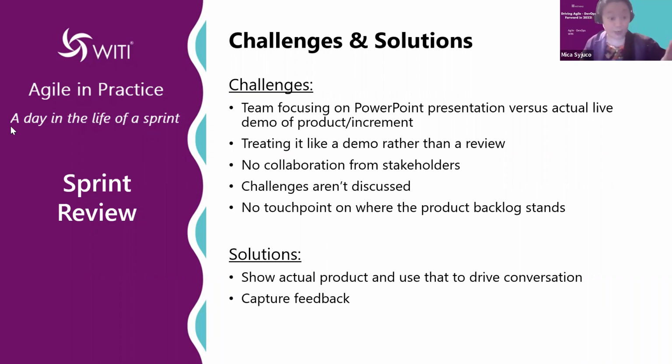This is a great point actually, because sometimes people make that mistake. They think, oh, I'm demonstrating to the product owner during sprint review, but you're not, because your product owner is supposed to be collaborating with you each and every day, every step of the way during your sprint. Who you're really demonstrating to and getting feedback from are the other stakeholders, not the product owner. I hope that helped.